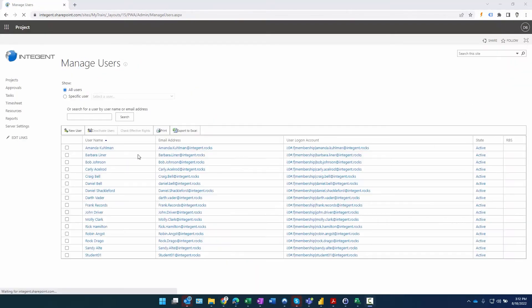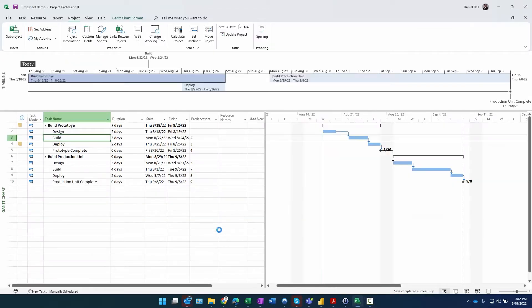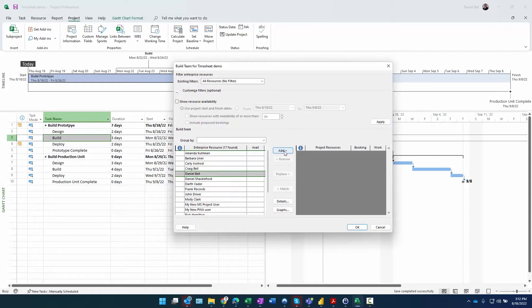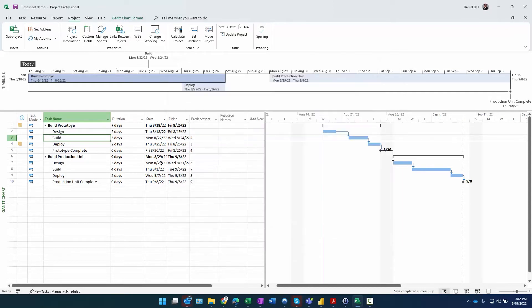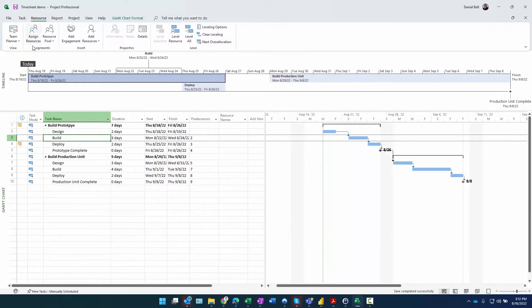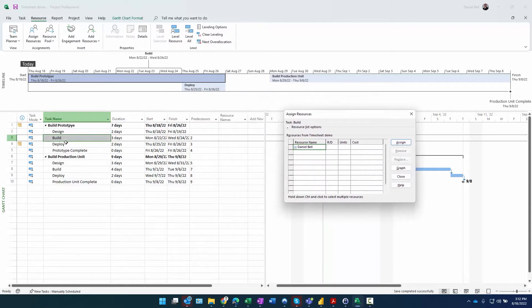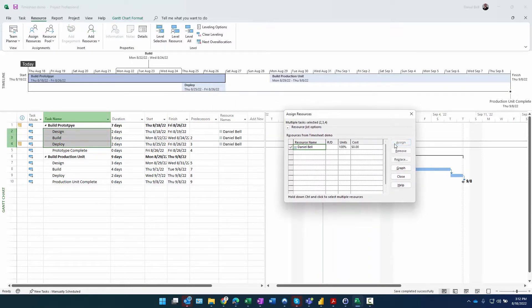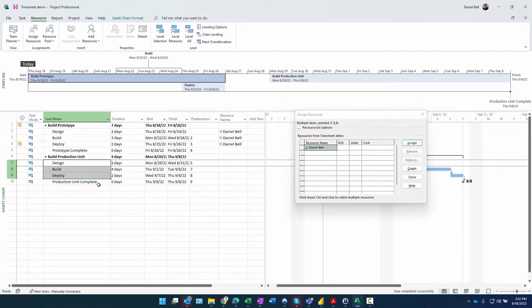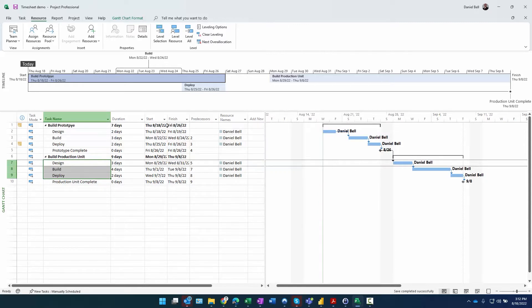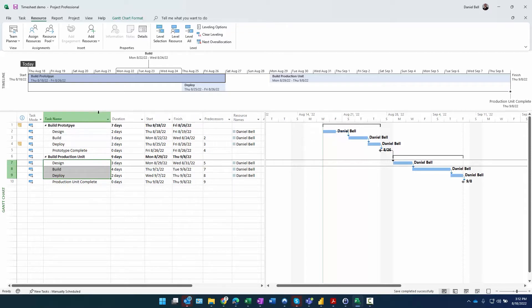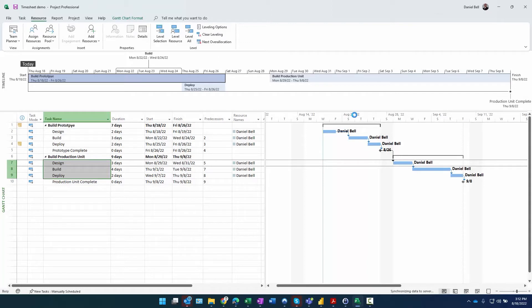The user cannot be assigned as a resource on projects and therefore won't show up when you try to build the team. After saving that info and going back to Project Pro, I do Ctrl+T to build the team and now I can see my record. I click Add, then use the Resource Assignments dialog box to highlight those three tasks and click Assign. The time frame looks good, covering this week and the next few weeks, so I'll go ahead and publish.